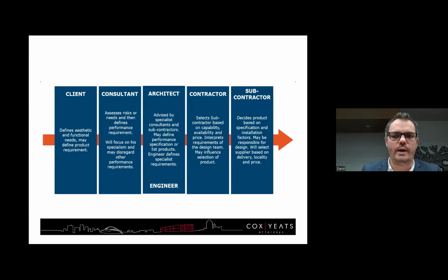Okay. One thing that you also need to understand is deal flow. And by deal flow, I mean the following. How does a structure come to be constructed? Well, you have an end user client. That client wants, for example, a large warehouse to be constructed, and the large warehouse has to have office accommodation in it as well. That client will traditionally go to a consulting engineer, and that consulting engineer will do the engineering drawings with an architect and a quantity surveyor. They'll produce the bills of quantities, the designs, the plans, the drawings.